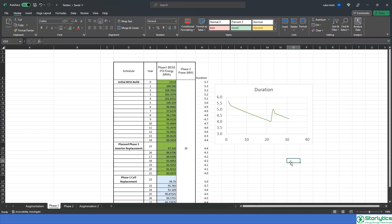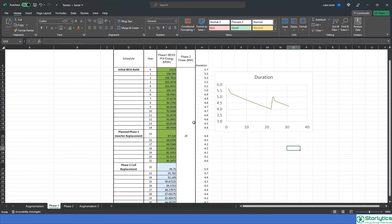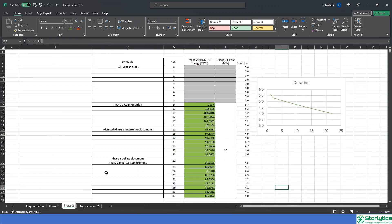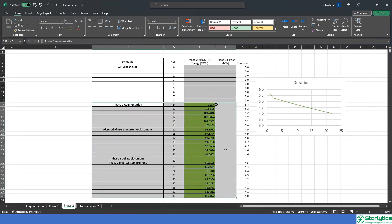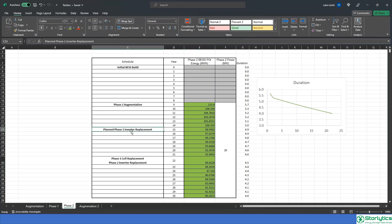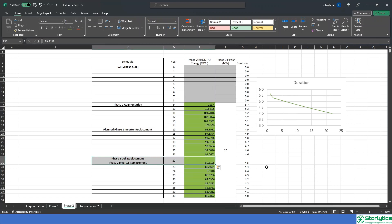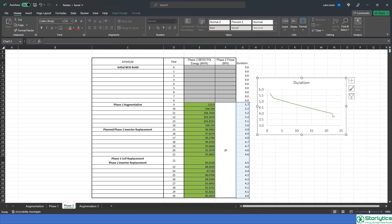Once phase one is modeled, phase two initial build years can be assumed. The subsequent phases can be assumed to have an early start so as to participate in the energy storage tax incentive and deployment act. Here we have assumed that phase two starts at year nine. Inverter replacement is scheduled after 15 years of operation, based on equipment life, warranties, and maintenance plans provided by several inverter manufacturers.